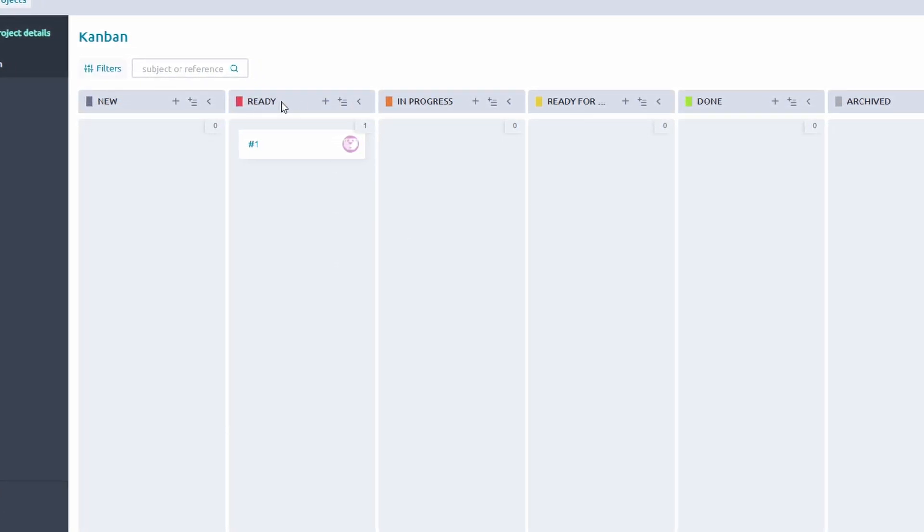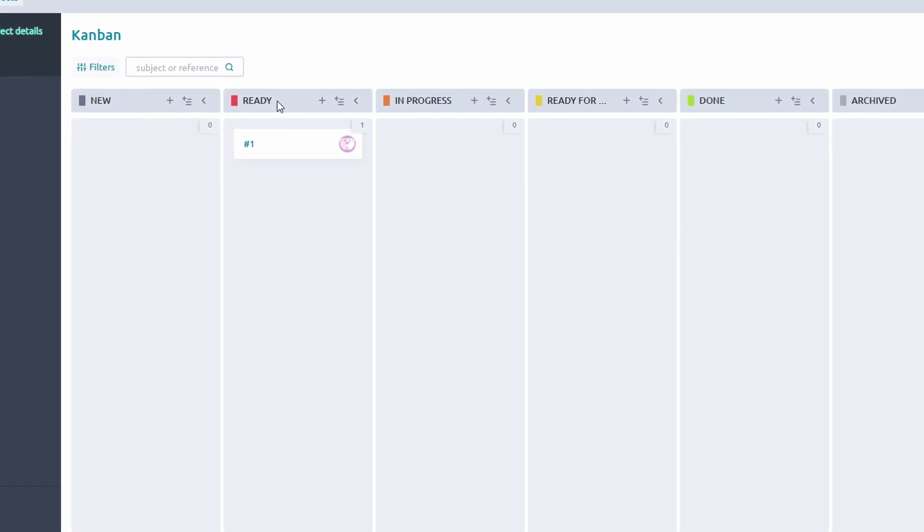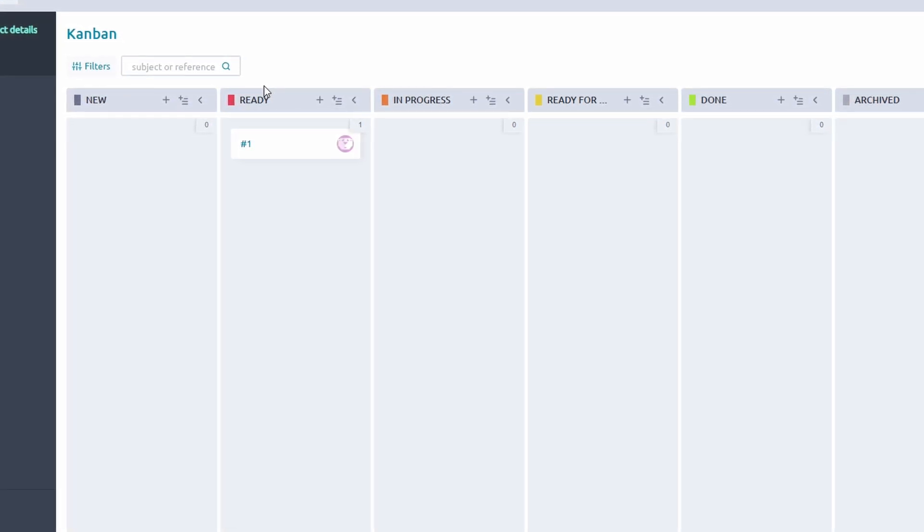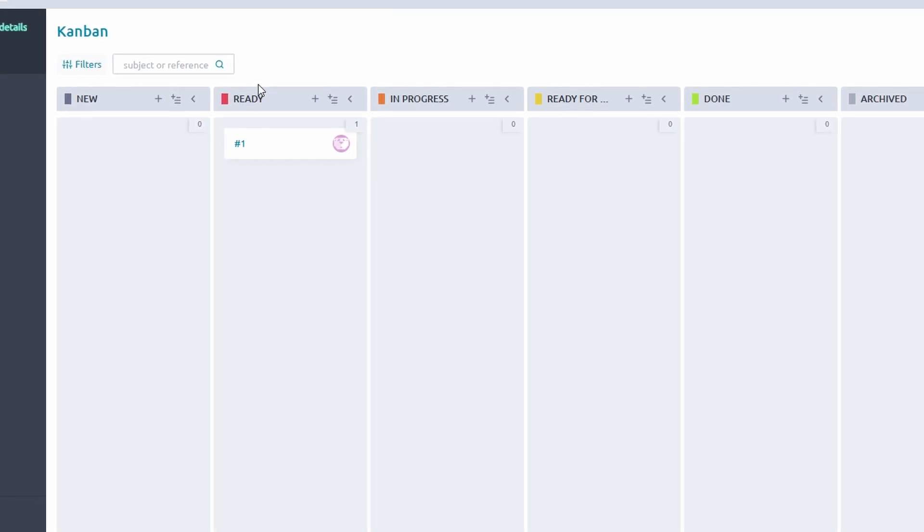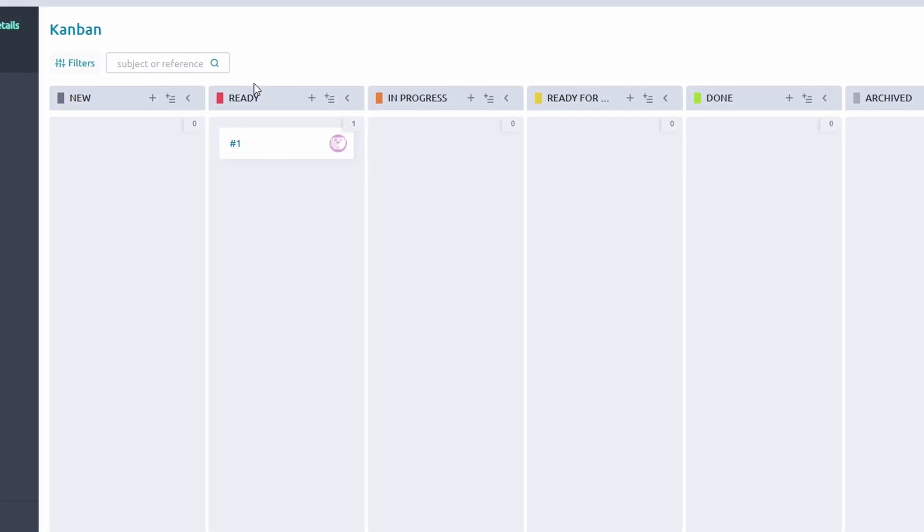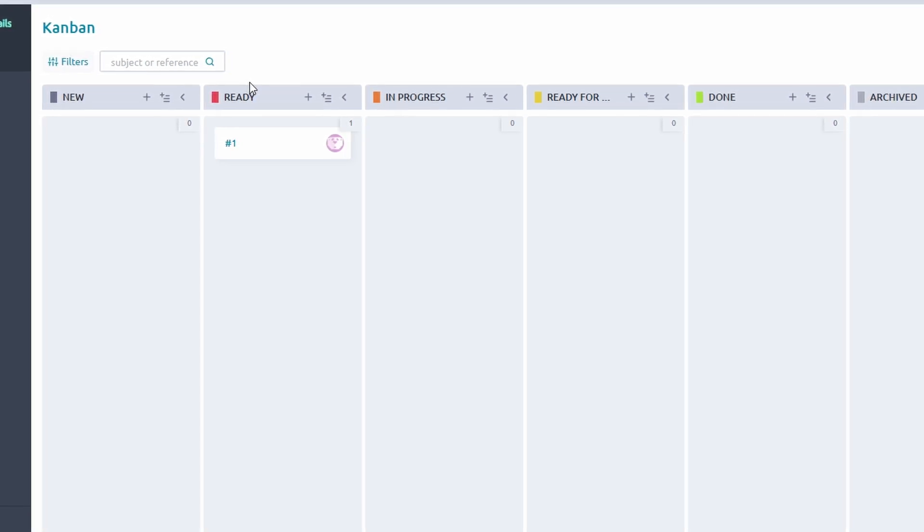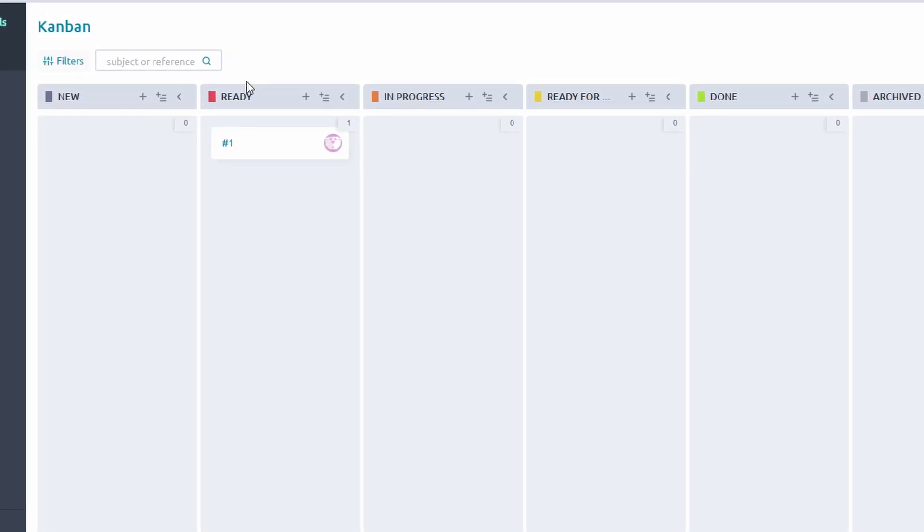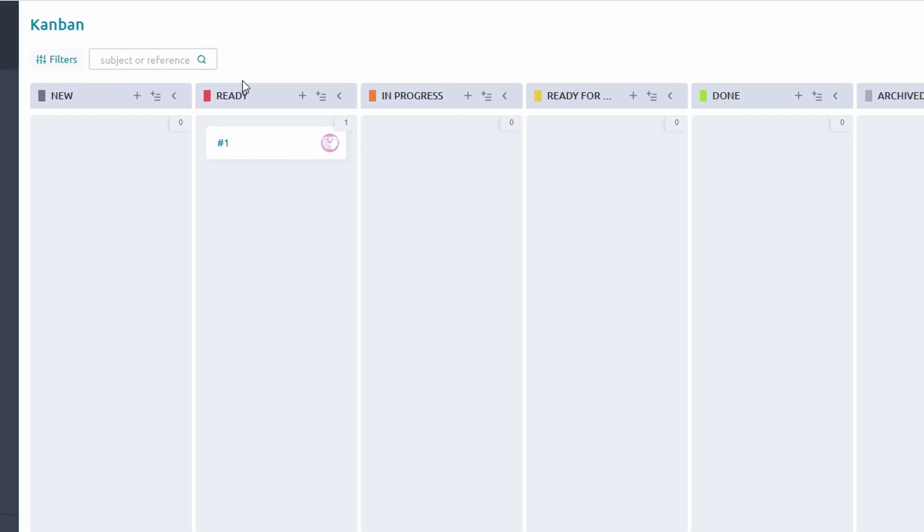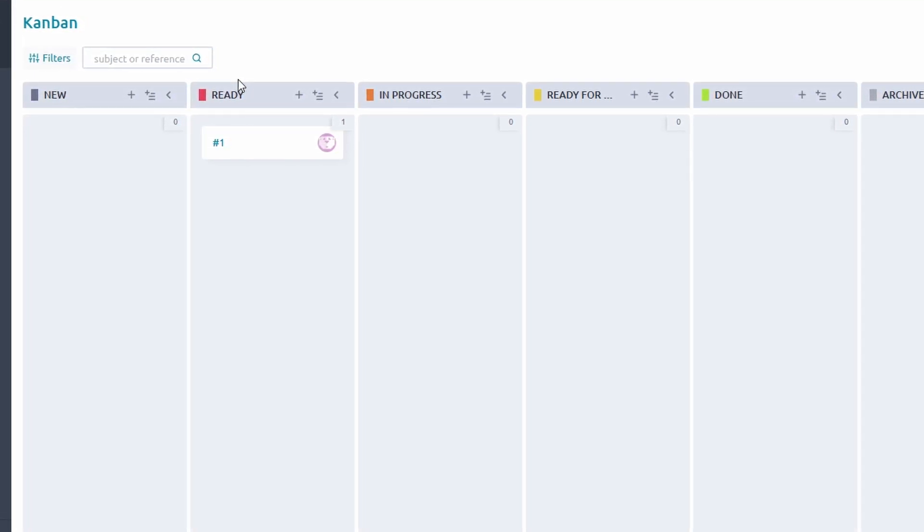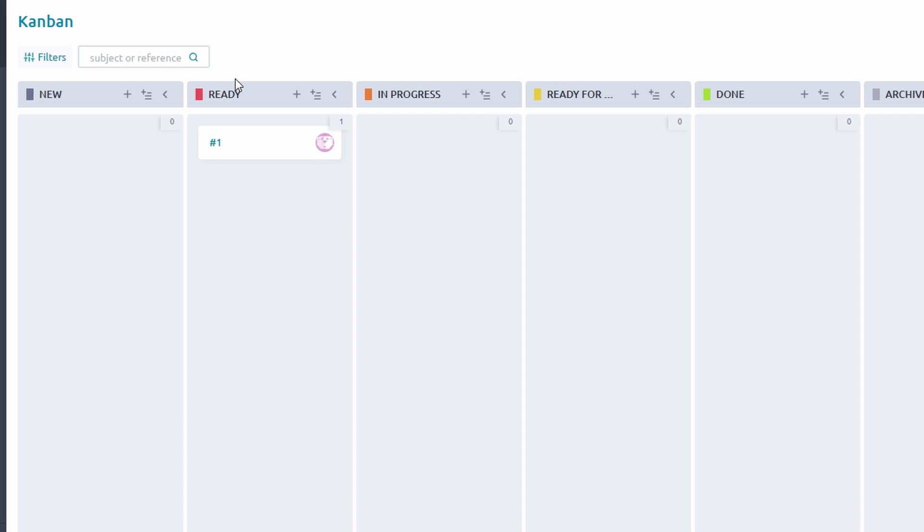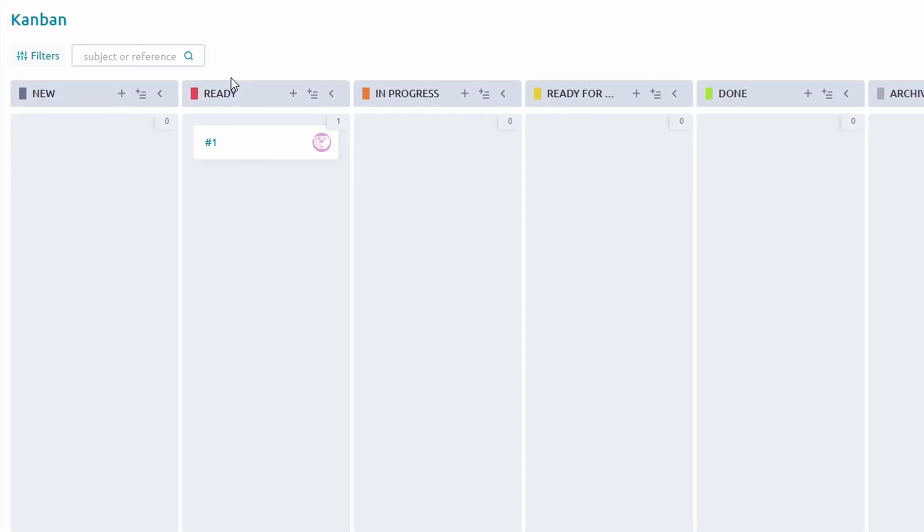Use the visual layout to identify where tasks are piling up. For example, if the Review column is overloaded while Development remains empty, it signals the need for adjustments in resource allocation or task prioritization. Kanban is all about continuous delivery and optimizing task flow. With Taiga's real-time updates and drag-and-drop functionality, your team can focus on moving tasks seamlessly from one stage to the next while keeping work balanced and efficient.